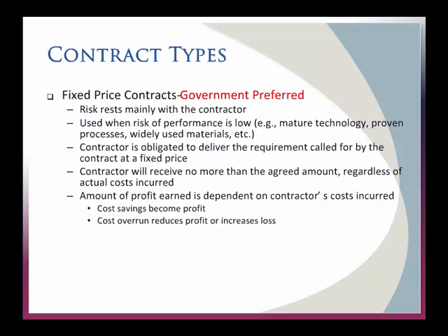If they say it's going to cost me $100,000 to give you 10 widgets, and the government agrees to this, and it really only costs them 50, they get to keep the other 50. We don't keep that. So that's what we've all agreed on. And if they figure out a way to do it cheaply, they can do it as long as they meet our requirement specifications. They can't be cheap and cut corners. We get to say what the requirement is, but they get to keep the difference, for the same reason that they have to eat the difference if it goes over.